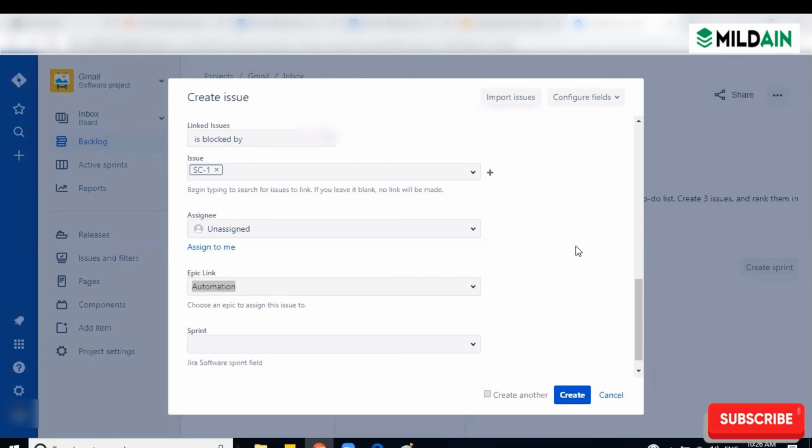And usually you will be pulling the stories based on the version number and the priority that has been given by the product owner. Usually 1.0 stories will be on the top, 1.2 stories will be below that, 1.3 will be below that. Like that, he will arrange. In case a 1.3 story is on the top, whichever story is on the top, we have to pull that into the sprint because we don't have any decision making authority. We, as developers, have to pull the story from the top.